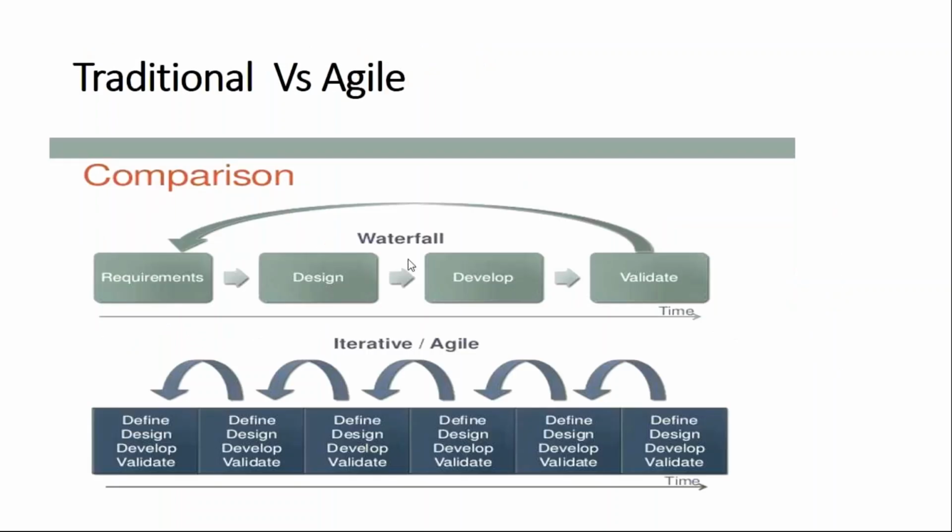So this is the comparison you'll find in a typical waterfall and Agile. I'll quickly run through it. Initially there used to be the requirement gathering session. Once it was done, they used to start with the design phase. Once the design was over, we used to go to development. And once the development was happening, since you are from the QA background, you'll be able to understand, they used to do the various kinds of testing over here. Until they reached this last stage, the customers were not involved in the various stages.